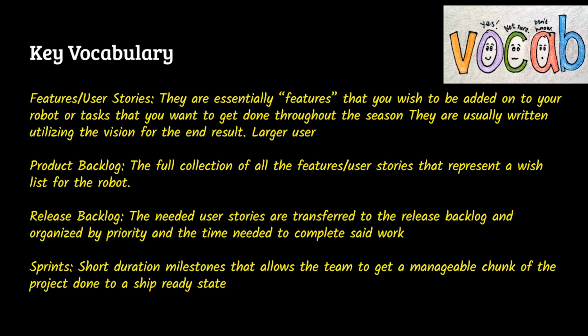Then there are sprints. Sprints are short duration milestones that allow the team to get a manageable chunk of the project done to a ship-ready state. And what I mean by a ship-ready state is that it's 100% done, you're not going back to fix anything. It's done at the end of the sprint. Whatever task you're doing there, it's done to 100%, you don't need to do any more work. That's the whole point of a ship-ready state.